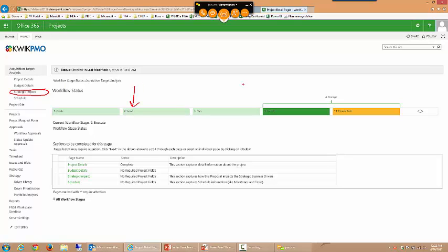And then later on, when we get to other phases in our project lifecycle, like the closure gate, or maybe even execution, through the workflow settings you're able to actually lock down that strategic impact statement. So after a certain point in time, people can no longer edit the score of the project against those drivers. So you can really govern who can make those changes and when they can make those changes via a governance workflow. If you don't use a governance workflow with your projects, then the strategic impact statement will show up as soon as the project is created, and you can't configure it to be read-only or read-write. It's going to be read-write throughout the duration of the project.